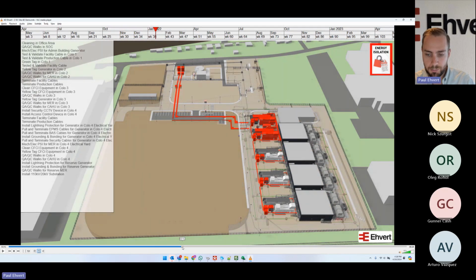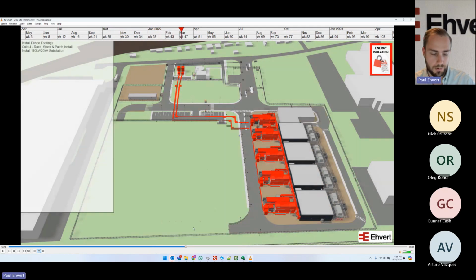Timing wise, does that work for your group, or what do we need to have ready? I know as soon as possible is likely the answer. So the real answer is we're looking at getting these OptiStacks in mid-July. For this to be beneficial, we'd want to have something in mid-June, so we have a month to walk through it and see anything that jumps out at us. Yep. So that 8 weeks is probably right there, if not a little bit tight.